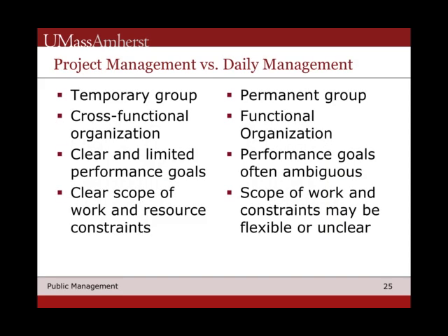So what are the big differences between what you're doing as a daily manager versus a project manager? Part of it is that project management is a temporary group as opposed to a more permanent group. So the types of control and coordination techniques you can use are quite different. Obviously, to some extent, you're always dealing with dotted line or cross-functional organizations when you're dealing with projects. So you're always dealing with indirect authority most of the time as a project manager, which is one of the reasons that it becomes much more effective to do things like performance manage than to try to use direct control or just rely completely on professional norms.